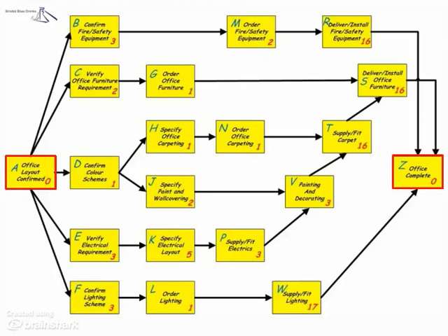The map now pretty much matched my thinking. I could see that lighting, furniture and safety equipment were the last stages before handover, and as far as I could see, the order of doing things was logical and the duration was realistic. Maybe a little over-cautious in some cases, but I'd rather have time to spare than be promising on something that I didn't think we could deliver. I checked it out with Fahim, the finance director, and facilities. They also agreed the timescales were reasonable, although they wanted to be more precise about when they needed actually to book the staff to do the work. I knew that, so I moved on to calculate when things would happen in relation to the start date.